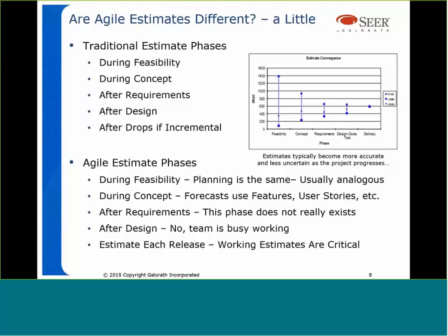And then certainly after design, and then with each incremental release, you can be building estimates. So typically what we see is estimates in these phases. Most often what I see is an estimate for the feasibility, then I'll see one right after requirements and one right after design. And these are typical gateways I see, especially in the insurance companies and the banks, and some of the mil-aero organizations are doing this as well.